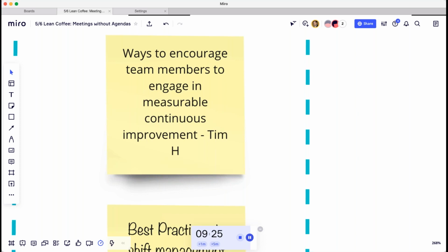Typically we do some capacity reservation, but only recently did I get the team and the product owner to agree that they needed to specifically reserve capacity for tech debt every sprint. They need to be allowed to just work on tech debt. Before then it was just, well, we know we're going to need some capacity reservation.